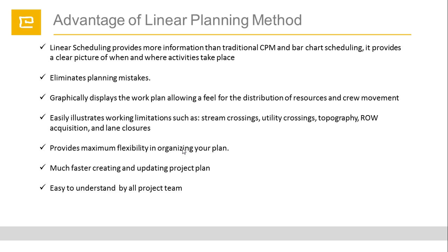It is very easy and saves a lot of time in preparation and changes, because changes happen very often in infrastructure projects. This is not like buildings, and you can always have to stop working because of some utility problem, some traffic diversion problem or environment protection problem. You need to change the plan during the project life cycle. That's why infrastructure projects require a dynamic way of planning, and planning never ends, and TILOS is very flexible to change and go forward.